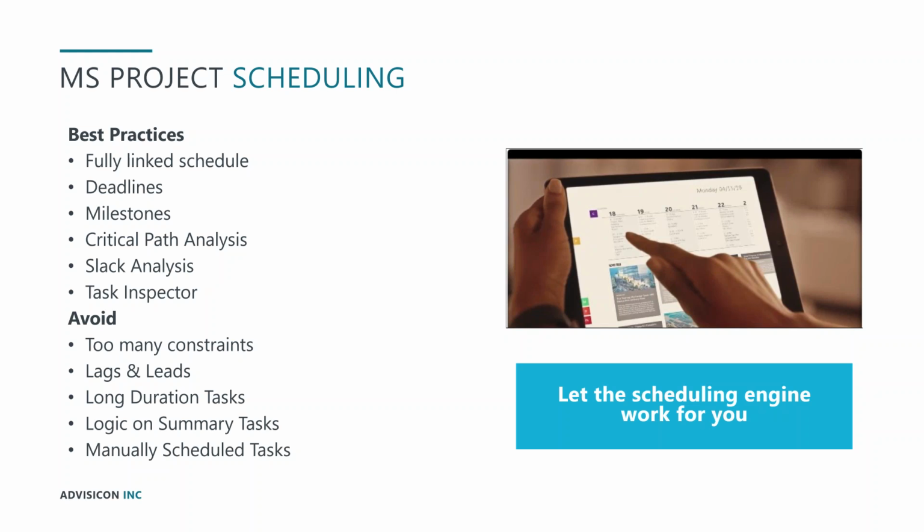Long duration tasks. I have a great example of this one. You don't want to have long duration tasks because it lowers your confidence. It's not necessarily a technical thing in Project, but the longer that task is, the less likely you are to be confident in it finishing on time.